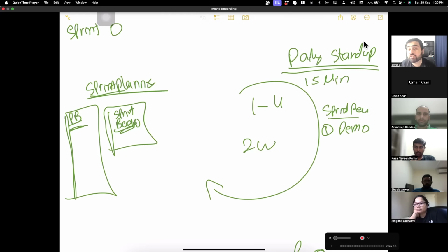That is called definition of done. My task will show I have done every single thing. If I feel this is completed, I will show it to the client. Otherwise, it will go back to the product backlog. Anything that is incomplete goes back to the product backlog. When I feel it is 100% completed, the client checks it according to his checklist, called acceptance criteria. If the client accepts it, it goes into product increment.